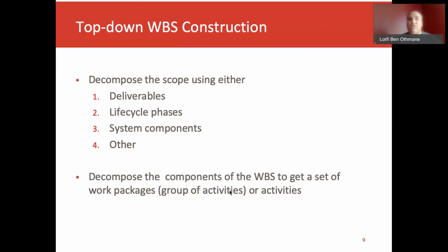The second approach is to use the life cycle phases. In the first lecture, we talked about the life cycle of a project, and we said there will be the requirements, the design, the coding, the testing, and the deployment. So we would also decompose the system at level 2 based on what we need at the requirements level, the design level, the development and coding level, the testing, and the deployment. Another approach, if we have an architecture that we've done already, is to decompose the system based on components: component one, component two, component three.